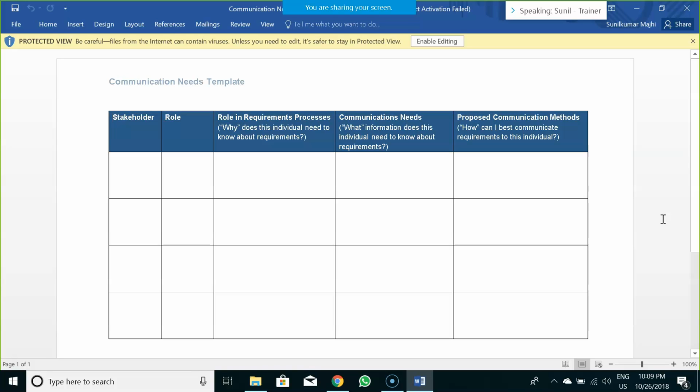But consider a service-based project wherein all the development has been completed through agile methodology, and the customer does not wish to change the methodology when it comes to maintaining and supporting that product. They still want to continue with agile. But considering the scope, it's a service-based project, so the product is already developed. Whatever change they bring in would come as a change request, and those change requests would be transformed into user stories.